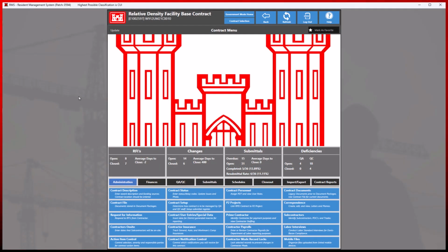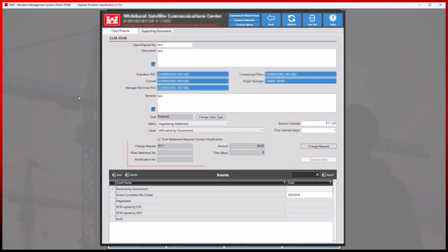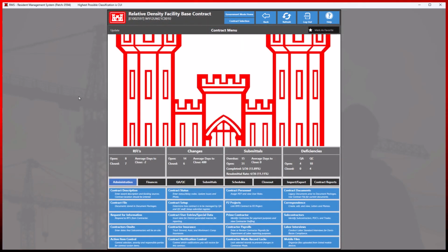Previously, a claim contained a single reference field tied to one change request. With real-world projects often generating multiple modifications affecting a single claim, this structure became restrictive. The new model reverses the relationship. Instead of claims linking to change requests, we now have change requests linking to claim. This enables multiple change requests linked to one claim, improved scope management, better alignment between commercial and operational tracking, and clearer dispute documentation.